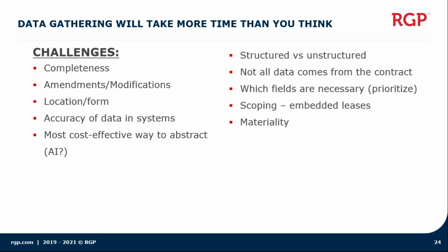So you perform your assessment as of a certain time, but between that assessment and the ultimate adoption time of the standard, your data is going to be changing. When you're managing the gathering of data associated with the deployment of a new accounting platform, it is a lot like nailing Jello, in that it's always changing.